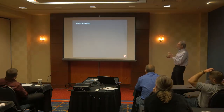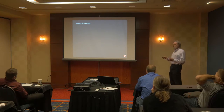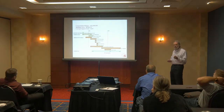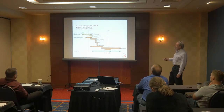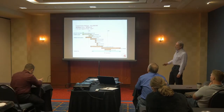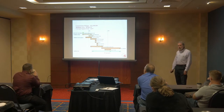And then we had a good friend on board. We were now working for J.E. Dunn. Something they cared about a lot was the budget and the schedule. That was a big deal to them. I don't understand quite why. But the budget for the project, Henry gave him $36 million. I don't know where the rest of it went. But anyway, the building budget was $24,300,000. The building was 68,000 square feet, so we were trying to hit a target of $357 a square foot.